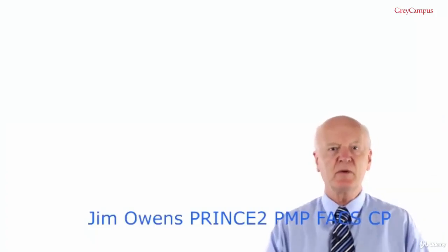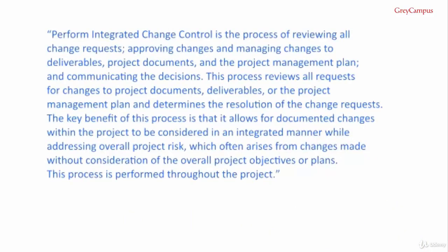4.6 Perform Integrated Change Control. Perform Integrated Change Control is the process of reviewing all change requests, approving changes and managing changes to deliverables, project documents and the project management plan, and communicating the decisions.